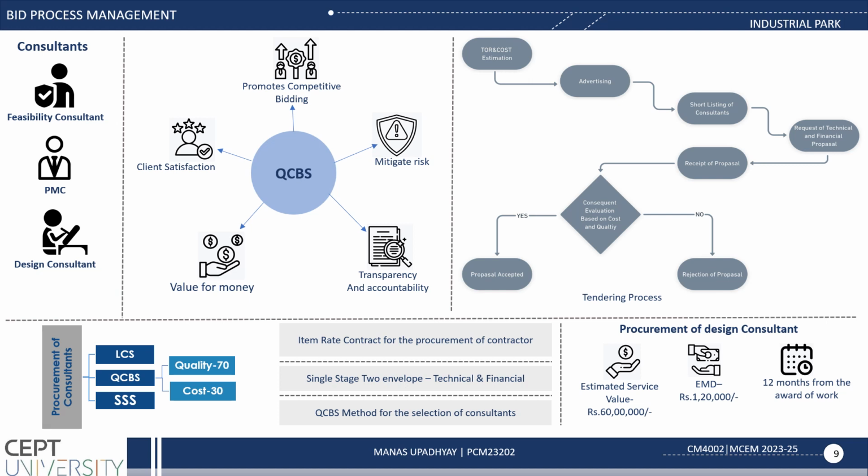As per best practice, we are going through QCBS because of these five reasons: it promotes competitive bidding, mitigates risk, transparency and accountability, value for money, and client satisfaction. For the procurement of the design consultant, the estimated service value is around 60 lakh. Out of 60 lakh, we have given the EMD value, around 2% of this, 1 lakh 22,000. The duration of this work is 12 months.